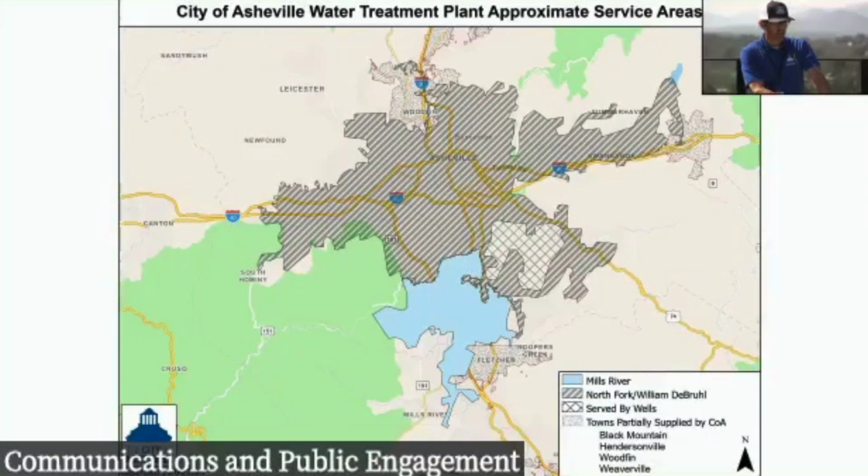And the last thing I want to note is I also want to make everybody aware our City of Asheville water crews had a couple of questions on the number of employees. I've confirmed that we have 181 employees in the City of Asheville's water department. They are also making repairs in preparation for the restoration process. So this includes they're out assessing, making repairs as they're found. And I want to be clear, as the system pressurizes in the coming weeks, we will continue to find new breaks and leaks. So it's important to know that there are many, many breaks and leaks that we are not even aware of yet. And we won't know those until we are able to pressurize the system.